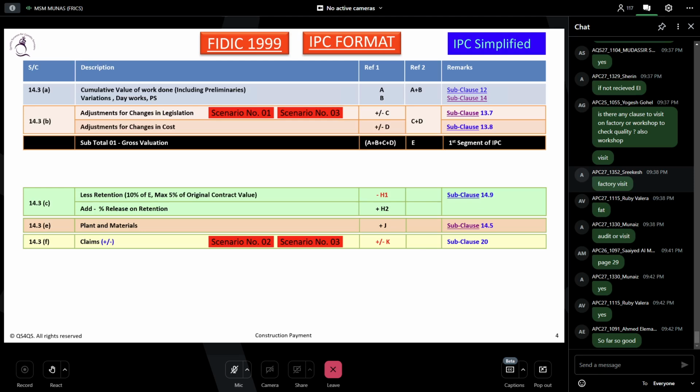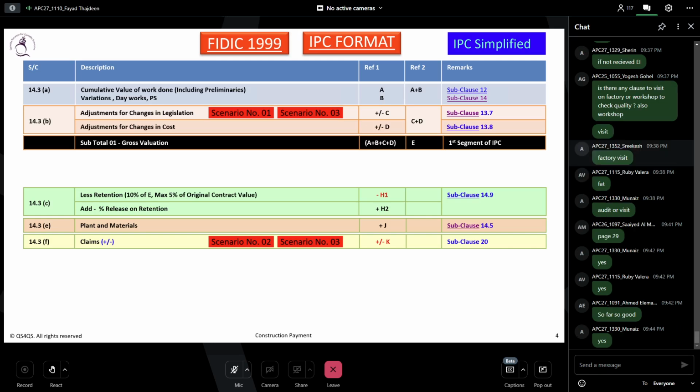Assume that a specialist consultant needs to be brought to the site in order to do the retesting. Every visit he will charge. So who's going to bear this cost? That's the reason, if retesting comes, you have to expect the employer claim. But again, as the contractor, you just don't pay if he writes the claim. You have to ask for the records: how much he incurred, evidence of payment for that incurred cost. You understood? Okay, sir, understood. Yes, you need to prove that.